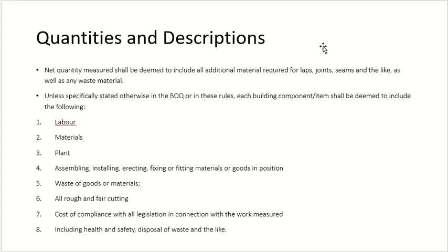So, what was I saying? It doesn't mean somebody will bring 1 ton of steel and put it on the side. I need to cut it, right? Same thing with the pipes. If I say I need 50 meter of pipe, it doesn't mean I need a 150 meter piece. So you have to cut it. So this cutting is included. Same thing with the flooring as well. I need this much area of tiles, so I have to cut some tiles. Cutting is included. Okay. What else?